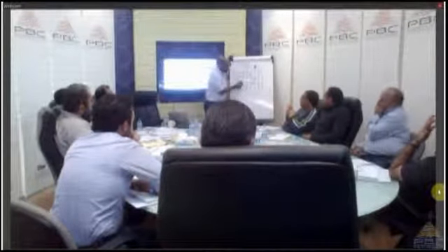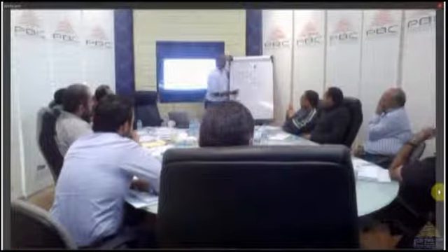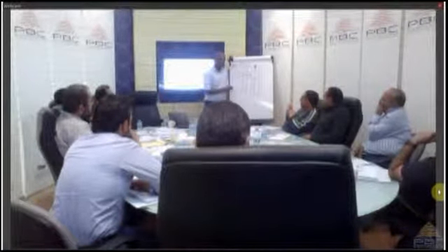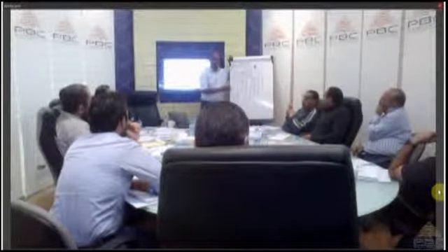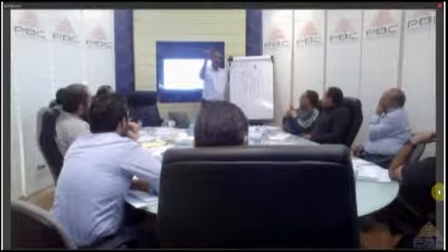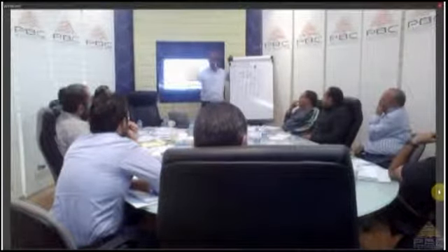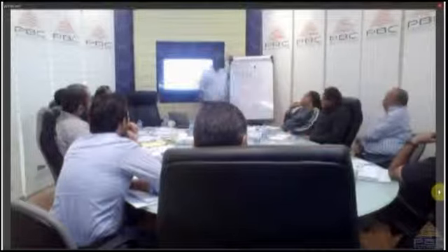The moment I kick this off, if it costs $1 million, I will report 500,000 on that activity, because it's just an indication that this is a 1 million activity and it's ongoing now. The full 1 million will be attributed in week 5.